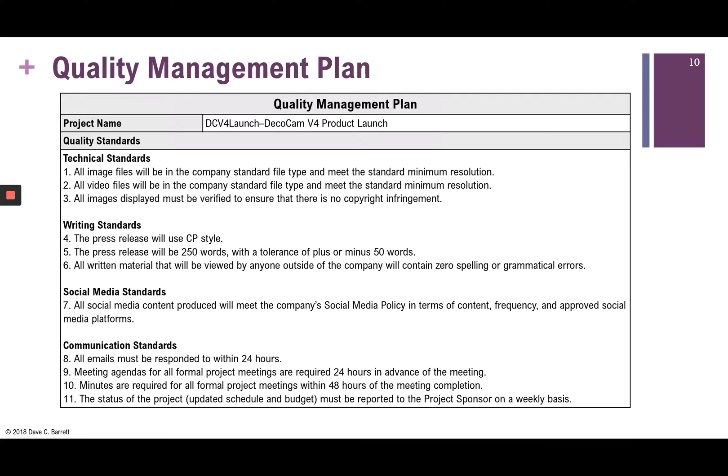Here is the quality management plan that was created. Under technical standards, for example, all image files will be in the company standard file format with minimum resolution. All images displayed will be verified to ensure there is no copyright infringement — zero tolerance there. Under writing standards, standard number five states that the press release will be 250 words — that's a specific metric, not just 'medium length.' If it's 245 or 262 words, that's within the tolerance of plus or minus 50 words.